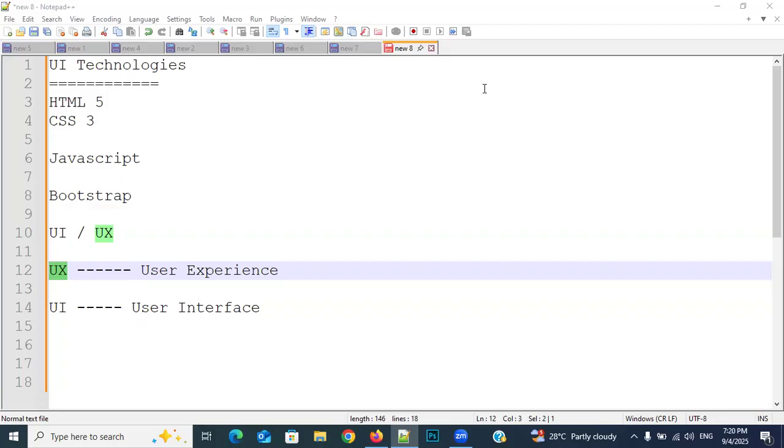If it is a very big application, for each and every module, how much time it will take to complete, everything they will plan. And whatever approach they need to follow, waterfall or any other model, they will decide that. Then after that, they will send the entire information: how many modules are required, how much time each module will take, how many persons are required, and how many years it will take to complete the whole project.